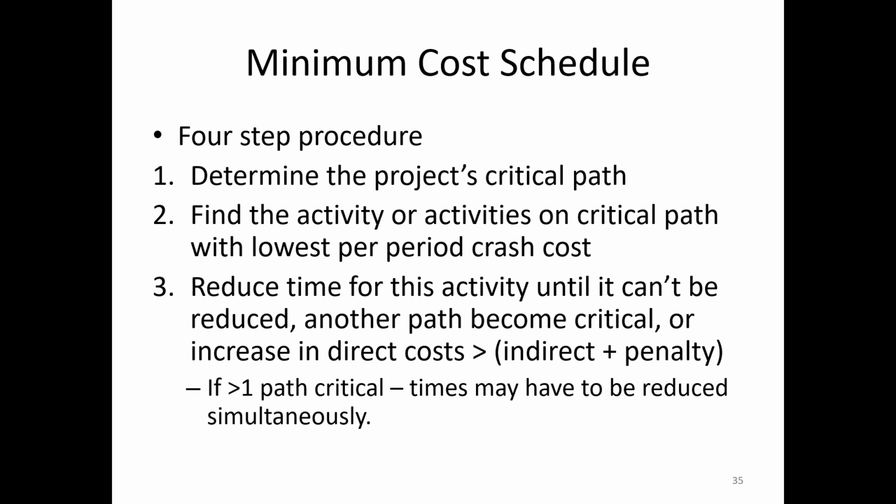Typically, bonuses are set to time. It's a fixed amount of bonus per some period of time, whether it's per week, per day, per selection of weeks, or per project. So we get a fixed amount coming into us as the bonus. And now on the other end, our idea is to meet that requirement by spending the least amount of money possible. Makes sense, right? Now we go on to step 3.